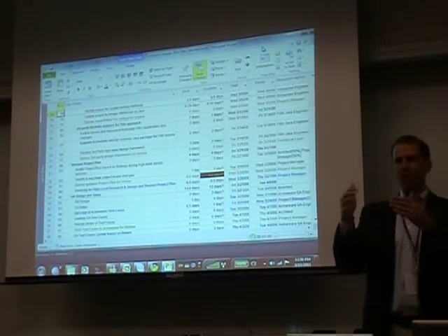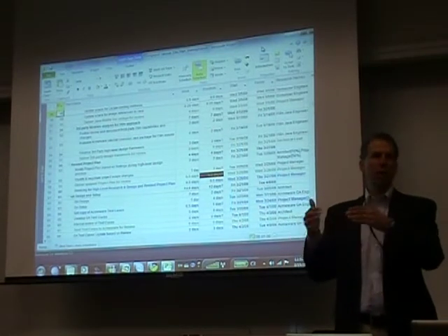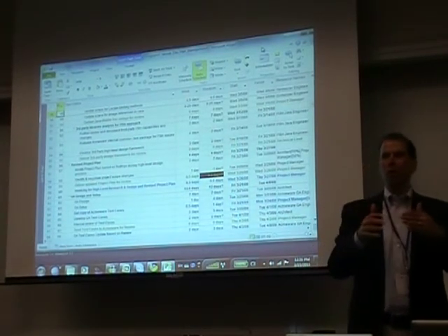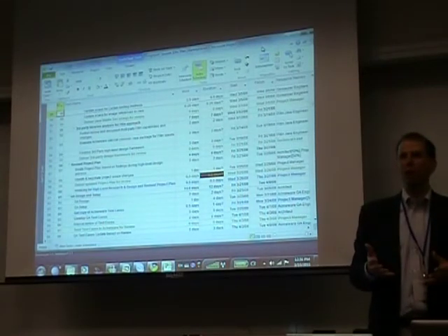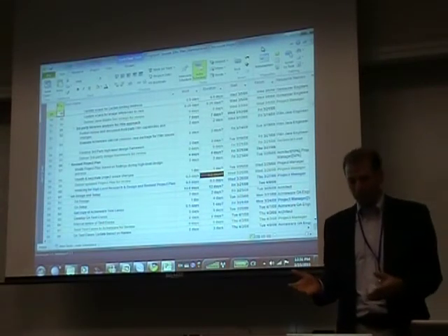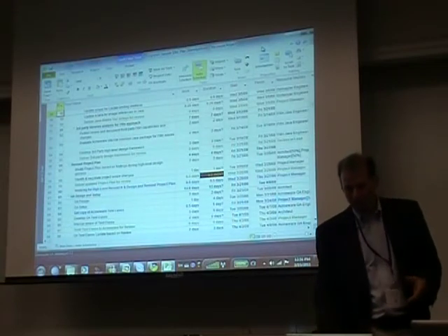And the project plan is your budget. You've got to come in on both budget and on time, so you want to be updating your project plan versus letting that drop, and you've got to allow time for that, your entire time.